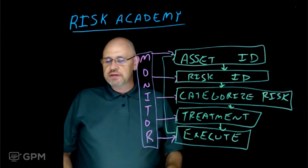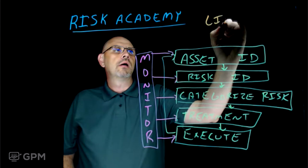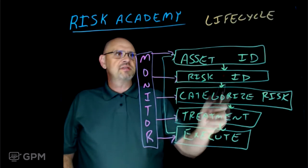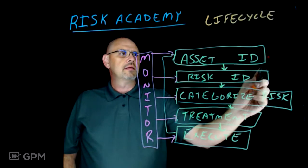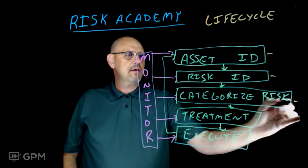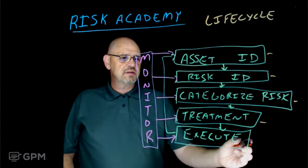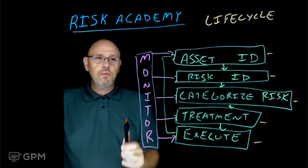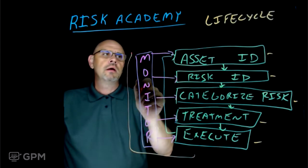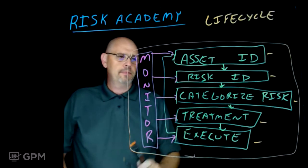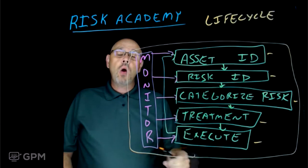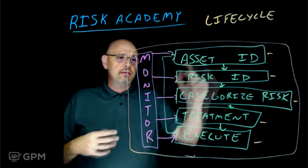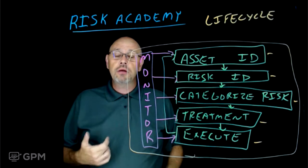Let's talk about the risk management life cycle. There is a life cycle to this. First thing we do is identify our assets, then we identify our risks, we categorize our risks, we figure out treatment options, then we execute it — maybe using a risk register. All along the way, we're constantly monitoring everything. We want to see how it's working and be able to identify new things. I call it the rinse and repeat — this is a cycle that's rinsed and repeated, but you're monitoring it along the way.